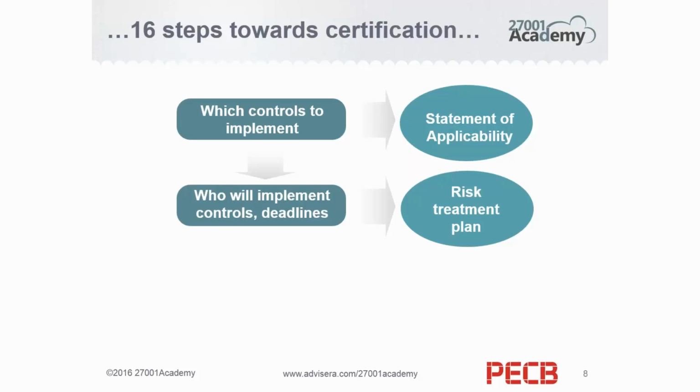John is asking, is the risk treatment plan part of the project? Yes, you could include the risk treatment plan in your project plan, but I would actually advise you not to do it, because the risk treatment plan is a document that will be, so to say, alive even after your project is finished. So after you initially implement the standard, you will still have some controls that need to be implemented.